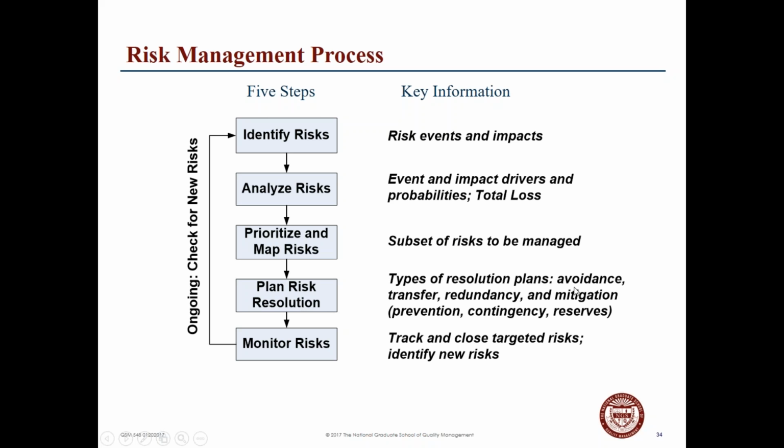What's the resolution? Avoidance, transfer, putting in more than one opportunity, mitigation? Do we have to put in contingency reserves? And then how do we look at the way in which those risks are monitored and identified for additional options or opportunities for risk to rear its head? So again, it moves down this structure. And again, the ongoing piece is to check for new risks. And again, identify them, analyze them, prioritize them, look at resolution and monitor risks going forward.